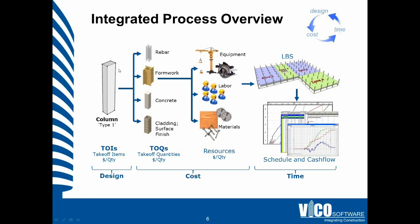For all of those takeoff items — groups of similar elements — we calculate the quantities inside VicoOffice by analyzing the geometry. We run calculation rules during the activation of the model. Those quantities, TOQs or takeoff quantities, can then be used to calculate the cost, the amounts of work — one level deeper — the quantities of amounts of labor, quantities of materials, and required equipment.